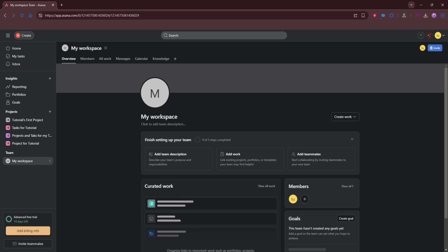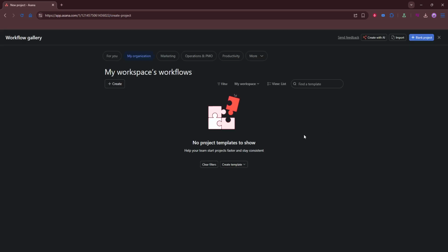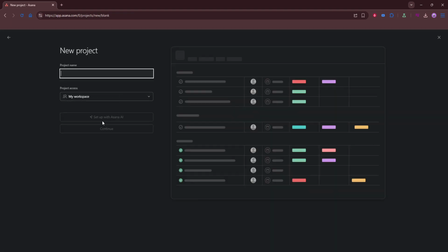With that in place, create teams or projects based on your workflow. Teams group people and permissions like marketing, operations, or specific client groups. Inside each team, create projects that represent initiatives, processes, or backlogs. When you create a project, choose the format that fits your style. List for step-by-step tasks or board for a Kanban feel. And add a short description so everyone understands its purpose.